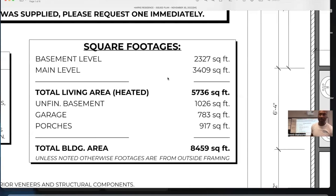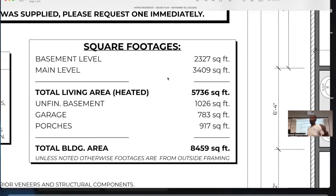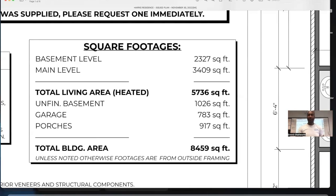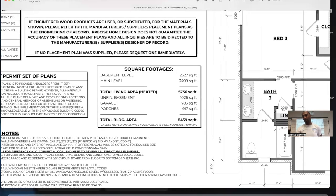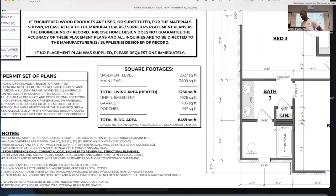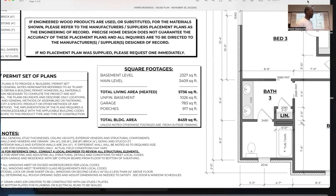Plus or minus 15 percent means I could be off almost $200,000 — that's a big number. Worst case, if I'm $200,000 above, the house could be closer to $1.2 million. So I went to his loan officer and asked how much he was qualified for. He was qualified for $700,000. That house is going to be around $1.4 million — his expectations are completely unreasonable, so I told him I couldn't work with him.